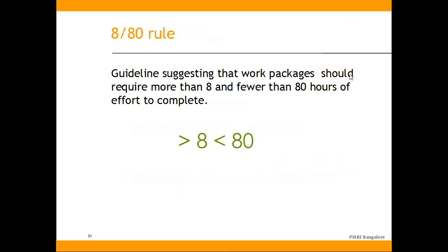880 rule, we already discussed. A guideline suggesting that work packages should require more than 8 and fewer than 80 hours of effort to complete. One key thing here is, whatever terminologies you are hearing for the first time, you will get questions. So any jargon or any terminology which you are hearing for the first time, please immediately take note of it, because you will get several questions on this 880 rule.